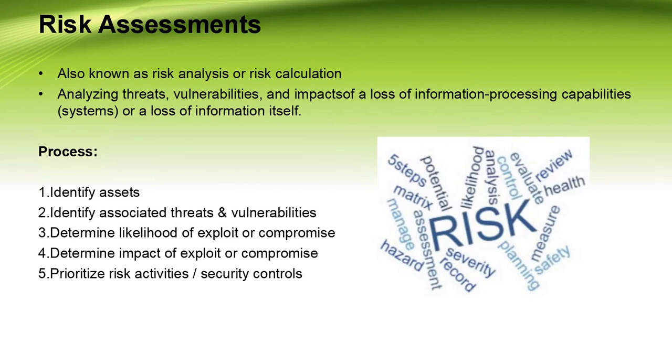Considering both the impact assessment and the risk assessment together best helps you assess the possibility and consequence of risk if they are realized. You can then prioritize risk based on the assessment to establish an importance ranking from most critical to least critical. Ranking risk in terms of criticality or importance is an important business function because it provides insight into where resources might be needed to mitigate the realization of high-probability risk events.